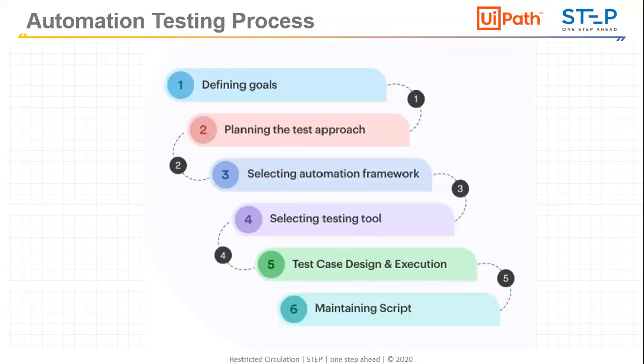Here I will define which test cases I will take in the first sprint or first phase. What is the impact of those particular test cases? How will I go with the planning so that the client will get an early picture of the automation and will get the early benefits? After 2 weeks, maybe the client will start working, that automation should work, and the client will start getting the ROI out of it, or the client will start getting the benefits out of it.